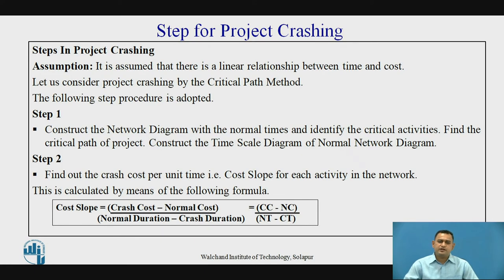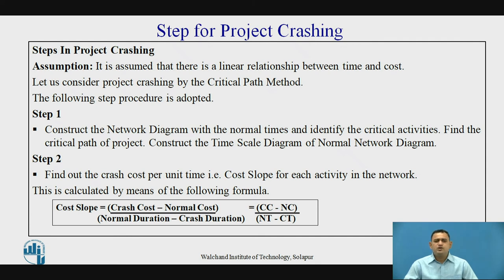Now let's see the steps involved in crashing of the project. The overall crashing is carried out with the help of the critical path method, in which all the earliest starting times are assumed for determining the project duration and critical path. Step 1: once we know the overall project, construct the normal network diagram — that is the AOA network diagram — with the earliest starting times, to determine the critical path. With that critical path, we then construct the time scale diagram, which is a representation of the normal network diagram drawn to scale.